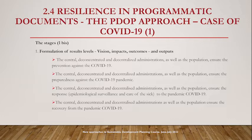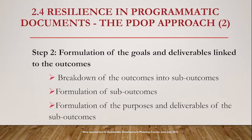The same will be done regarding preparedness, and the same for response, and so on for each of the phases of resilience. Similarly, the second step involves formulating the purpose and deliverables linked to each of the outcomes obtained in the previous step. We need to break down the outcomes to have a specific outcome for each sub-group, and then after formulating the sub-outcomes, we formulate the purpose and deliverable linked to each. This has been shown in module two of the course.